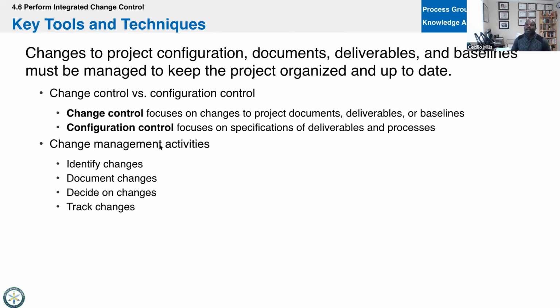It would be like the idea that after you save a document, it says, okay, scope statement, maybe you go year, month, date, 2019, 0223, V1, V2, V3. Some of you might do V.1, V.2, V.3. Some of it might be A, B, or C. Or sometimes there might not even be a version. So whatever your file naming schema, that's what configuration control would be. This would be how we know the difference between iPhone S and 6S and 6, or 7S and 7, because we have this documentation. So configuration control is going to focus on that.